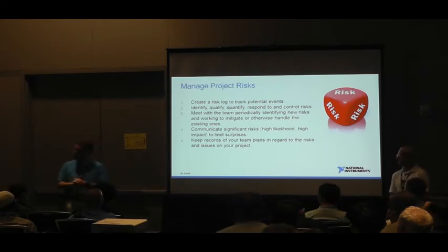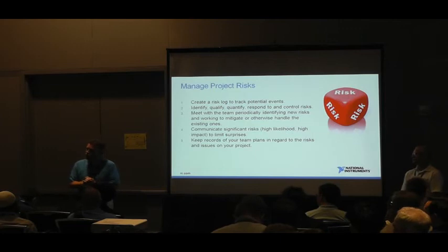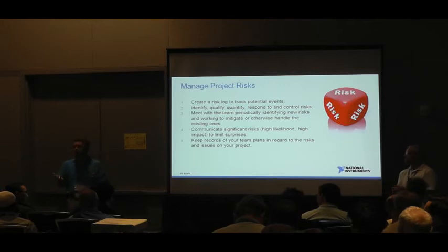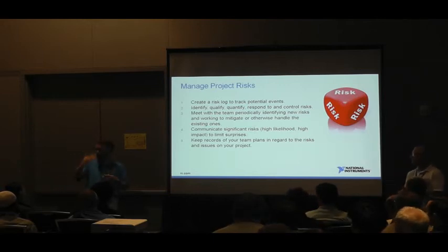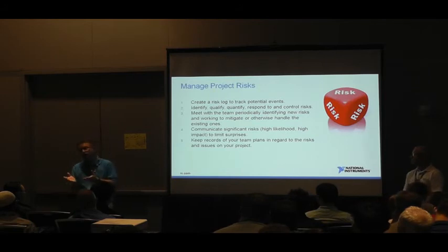Do you prioritize things that may be risky to do them first to get to know the risk? Okay, so the question was, do you prioritize the things that might have risk and slide them forward in the project? And I think that's a valid thing to do. You know, hey, interfacing to this piece of equipment might be really hard. Let's make sure we can do that before we move forward. And that could also be a discovery phase.